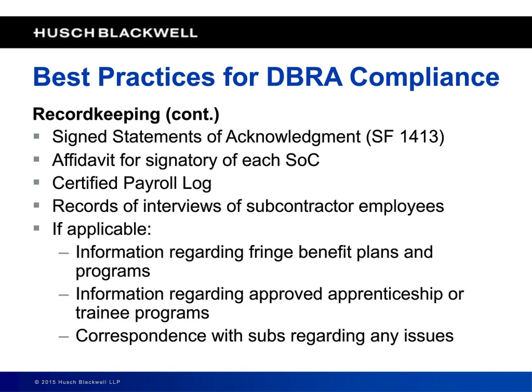Finally, to the extent that there's an apprenticeship or trainee program, make sure that you have documentation that that program has been approved by DOL's OTEL's office, the apprenticeship office that we talked about earlier, or a state program that the Department of Labor recognizes as well. And these are the records that I recommend that you keep.